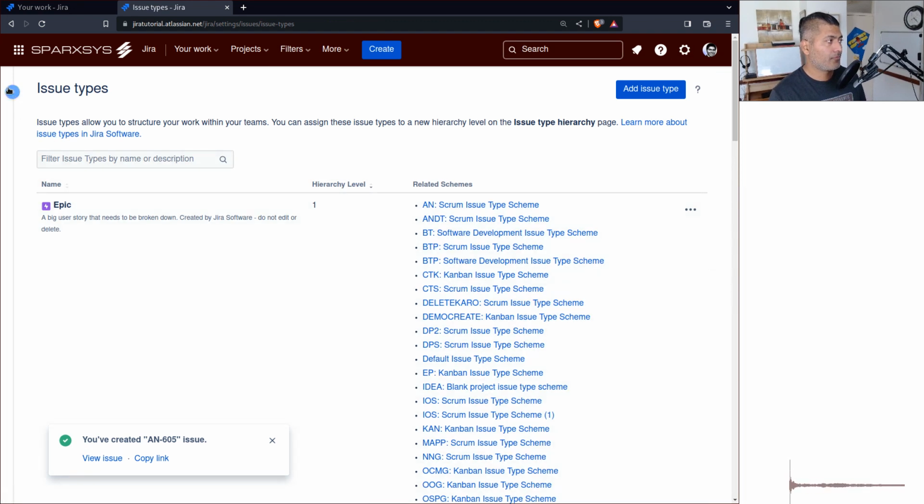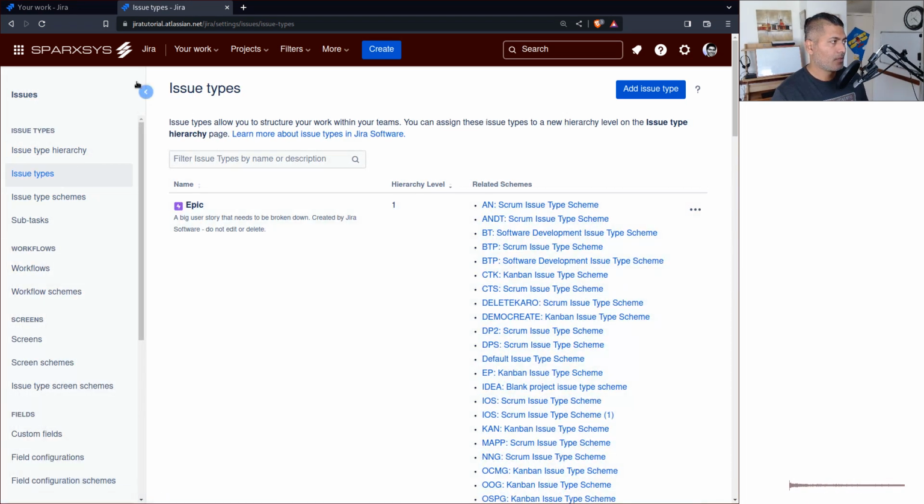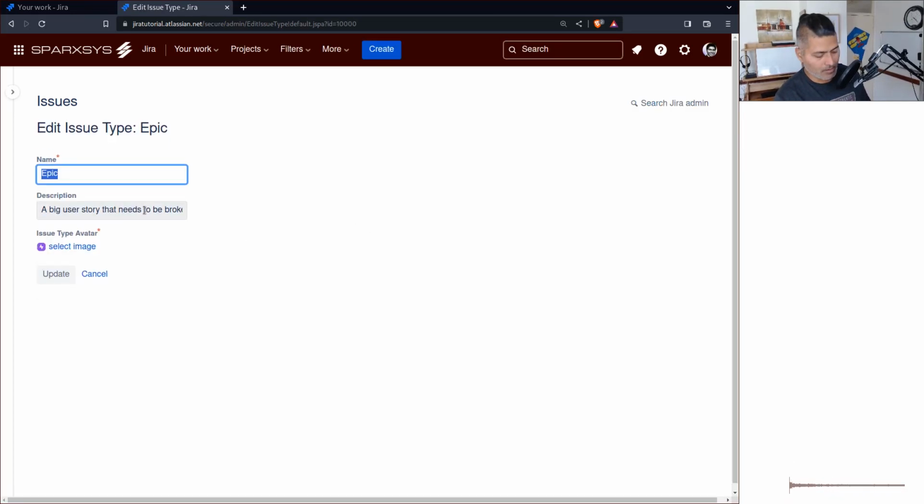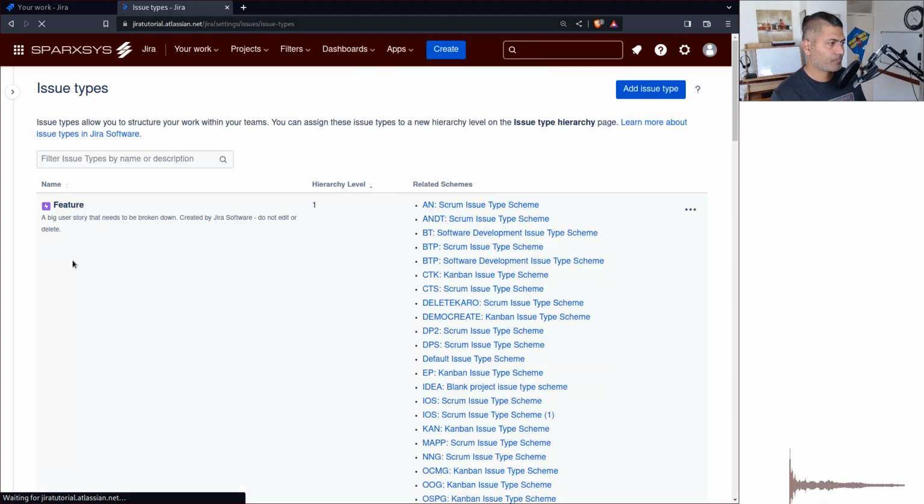that you can do. If you go to your issues and issue types, you will find, of course, the issue type, which is an epic, and you can click on edit, and you can say something like feature, right? Now click on update. Now you will probably be very happy that, wow, I have renamed my epic, and you might think of celebrating it, but don't do it, because renaming this epic to feature, you can do it, but it is useless.